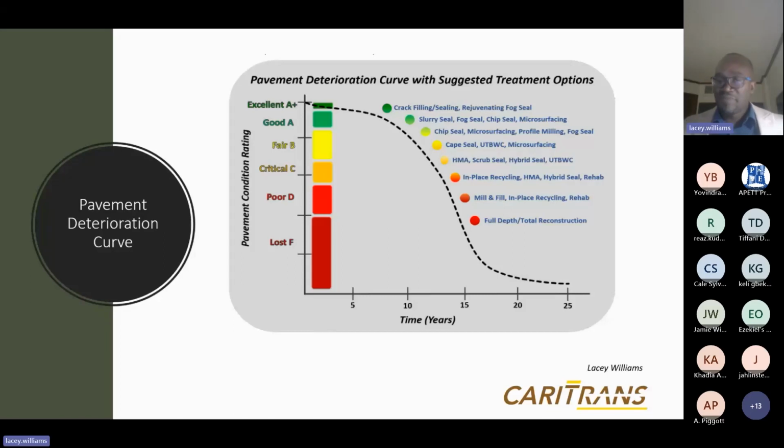By the time we're complete with that, an inordinate amount of time goes by, and I think everyone here understands that project cycle. So what you find is that, and look carefully at the rate of deterioration here, within maybe 2 years or so, we go from a fairly flat portion, let's say 3 to 4 years, a fairly flat portion of the curve to a relatively steep portion of the curve.